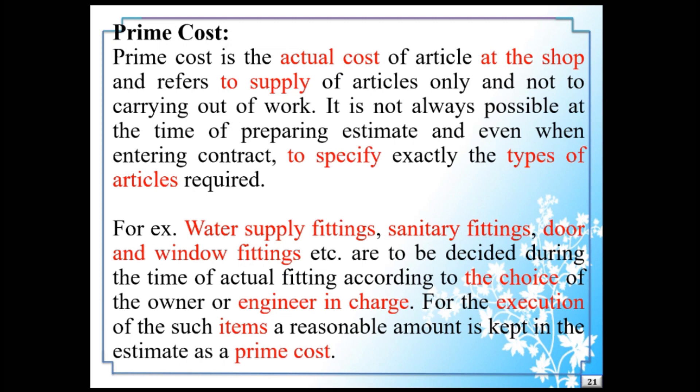Next one: Prime Cost. Prime cost is the actual cost of an article at the shop and refers to supply of articles only, and not to carrying out of work. It is not always possible at the time of preparing an estimate, or even when entering into a contract, to specify exactly the types of articles required.